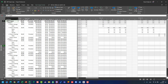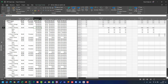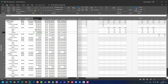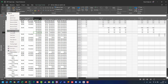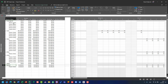In Task Usage view I see the Cost table structured in tasks, with resources under each task — the total amount for tasks and the total amount for each resource belonging to that task. On the other hand, if I switch to Resource Usage view, I will see resources and all tasks which belong to each resource. But I am looking at the same Cost table.